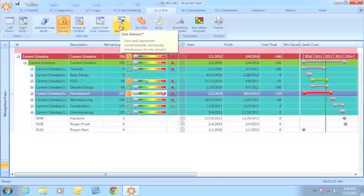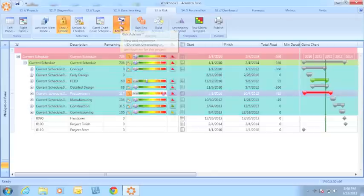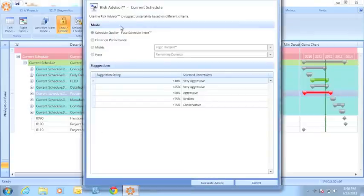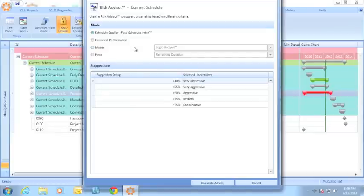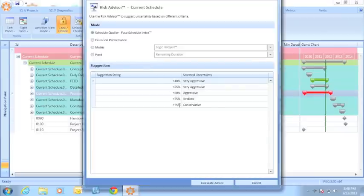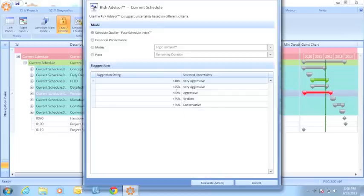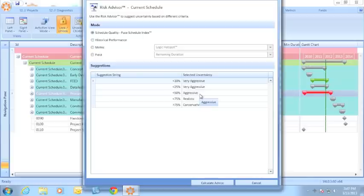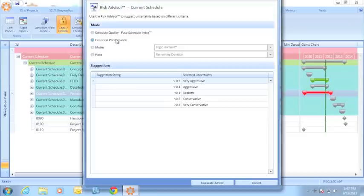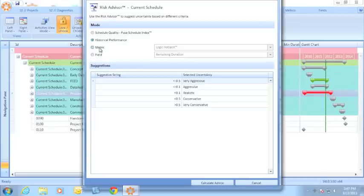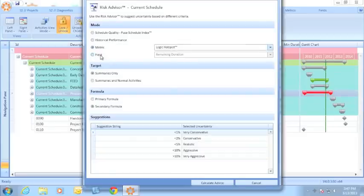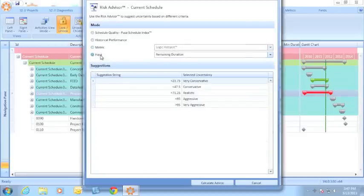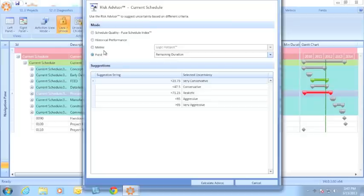However, with the new Risk Advisor, I've made that process a lot easier. The risk advisor provides recommendations for uncertainty assignments based on a given criteria. I can look at schedule quality where the risk advisor will say any activity with a schedule quality or a few schedule index of greater than 75% will be recommended to be flagged as conservative. Similarly, if an activity is scoring less than 50% for the few schedule index, then that activity will be recommended to be an aggressive uncertainty assignment. I can also make recommendations using historical performance, or look at an individual metric or even a field from within my schedule including standard fields or user defined fields.